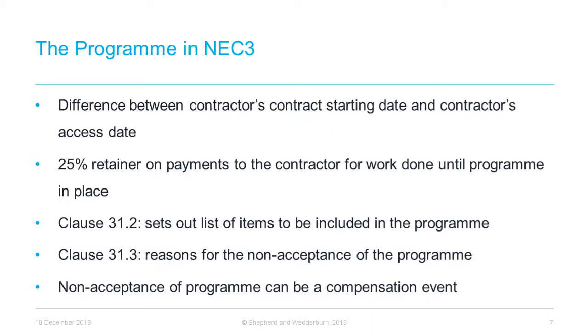If the program is included in the contract data, then it is automatically deemed to be the accepted program. If the program is submitted afterwards, or there are any revisals to the program, it will only become the accepted program after being accepted by the employer.